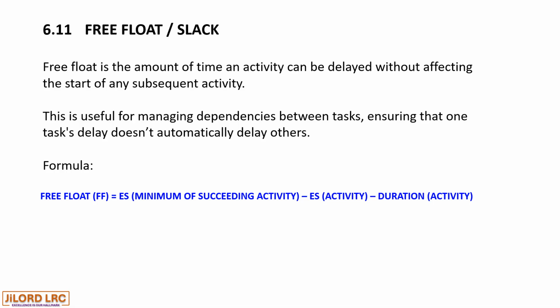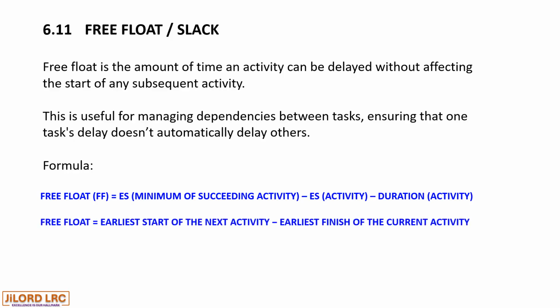In other words, the free float can also be the earliest start of the next activity minus the earliest finish of the current activity. So any of these formulas would help us to calculate the free float.